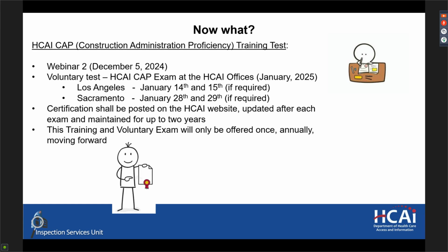So based on your knowledge and knowing that it is on risk, once you send the email to us for concurrence, you basically can direct the contractor to go ahead and move forward with that NMA.